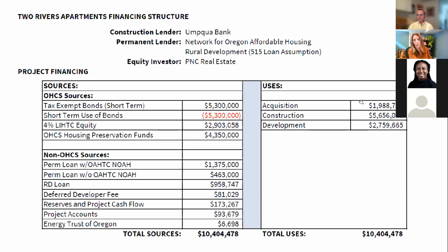Sometimes you can't achieve the right economies of scale to secure tax credits unless you have the right number of units, and that might require congregating a couple of projects in rural communities, because a lot of times they're 20 units apiece or 24 or 12. And so I think it's a really important additional strategy, and since this was the strategies for preservation session, something to highlight as a different way of looking at a project, to think about it in a portfolio is really important.